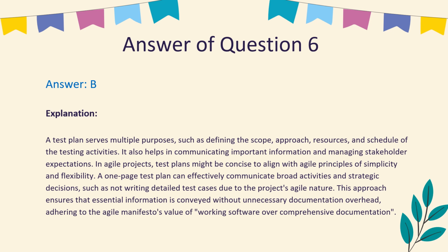A one-page test plan can effectively communicate broad activities and strategic decisions, such as not writing detailed test cases due to the project's agile nature. This approach ensures that essential information is conveyed without unnecessary documentation overhead, adhering to the Agile Manifesto's value of working software over comprehensive documentation.